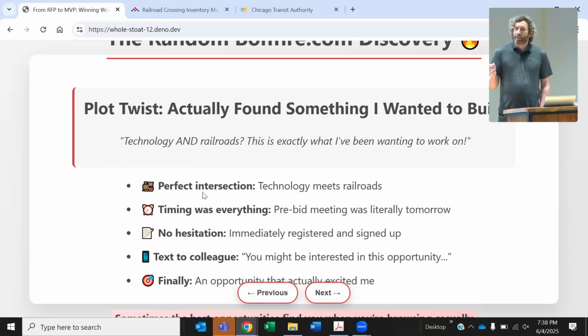Basically, all the railroads were required to inventory their crossings. And believe it or not, that gets fairly complicated, especially in the case of Metra. They have around 700 grade crossings, and every piece of equipment on those grade crossings has to be identified and kept up to date. If it's modified or changed in any way, it has to be updated, or every 2 years if nothing changes. That's everything from the highway speeds to the traffic markings to the actual equipment that runs the gates.